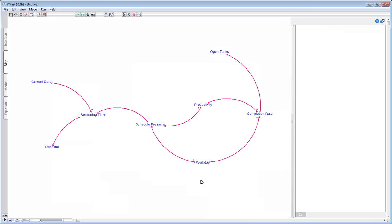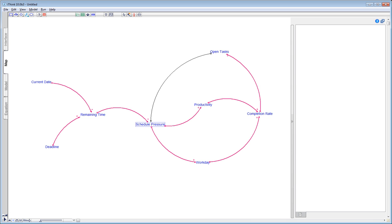Now, have we captured all aspects of schedule pressure? What other factors affect schedule pressure next to the time remaining? Well, clearly if we've completed all tasks and nothing remains to be done, the schedule pressure drops down to zero. Therefore, it's clear the schedule pressure is also affected by the number of open tasks. If the number of open tasks goes up, so does the schedule pressure. Therefore, we place a small plus sign next to the connector.